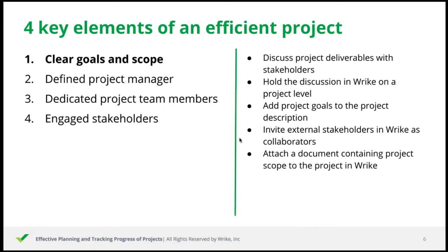If you want the stakeholders to be able to edit the draft, attach it as a Google Doc or MS Word file. Or you can paste it into the project description and only once any suggestions are made by the stakeholders, you will simply edit it. The key result here is that all the expected project deliverables are going to be listed in Wrike, and you will always have them available for future reference.